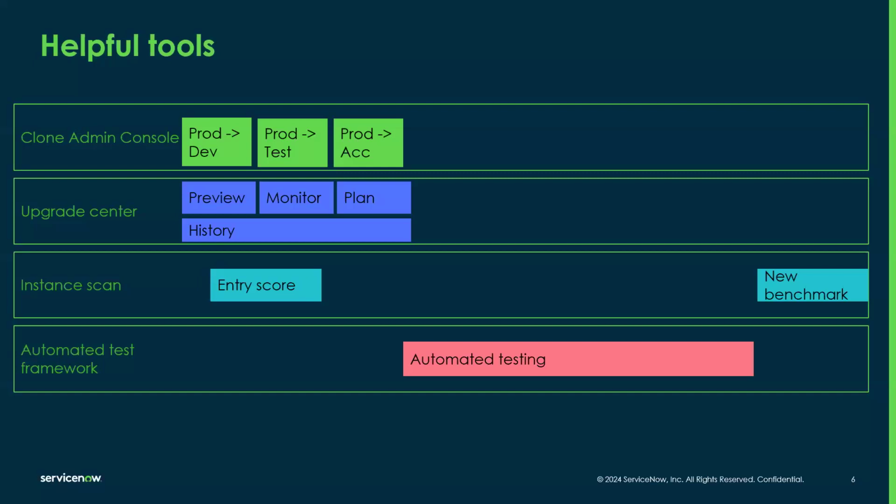If you find it in test, then it's already the developer that has seen it, touched it, worked on it. You had to install it on test. Somebody else looked at it, so it's two people already, increasing the cost. And then acceptance, increasing the cost again, and then in production. And production, that also includes maybe a change freeze, a rollback if it's in a mitigating action. So it's quite costly to run those tests only on production.